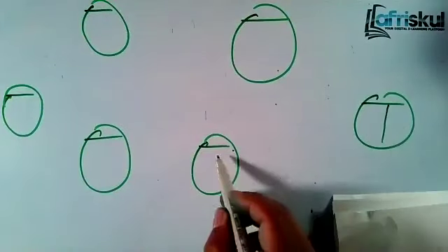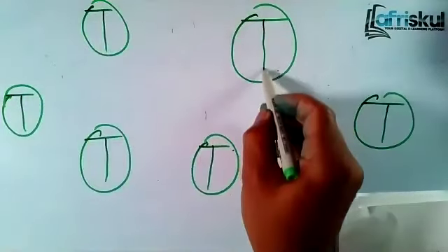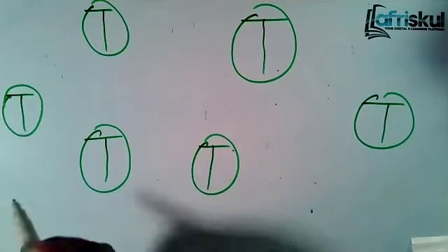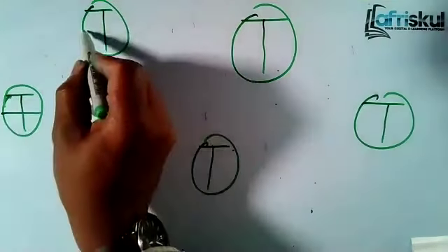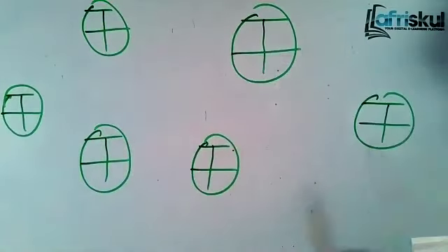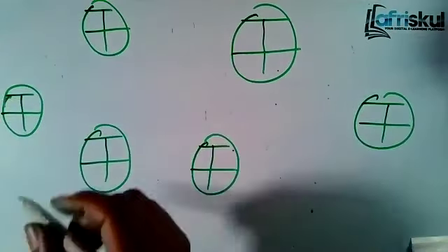This is what we are doing. Previously, this is what we were doing. But in this case, since we are doing the crashing, we have the normal time, we have the crash time. You can divide them by 2 like that. The upper side, you show the normal time. The lower side, you show the crash time.